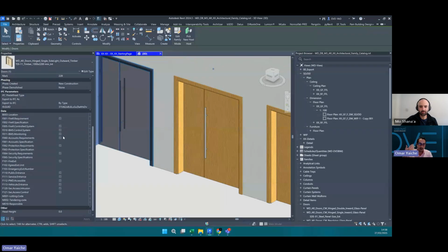And if you are talking about IDS, we can create our own IDS each time you upload your model. If the information within my parameter matrix is not filled, the model is rejected, or accepted with some adjustment.